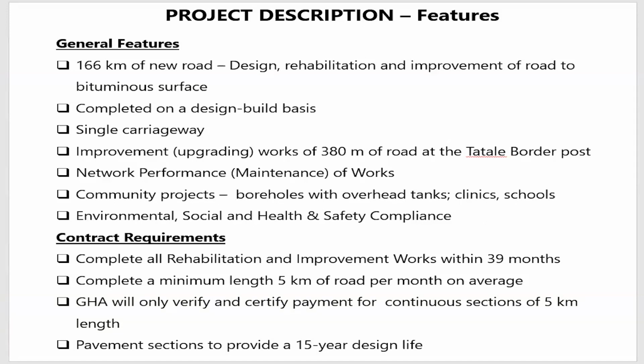We are doing a lot of complementary projects. That is to lay an optical fiber from Tamale to Yendi. The 166 kilometers, we are laying an optical fiber. I think we have currently finished 106 of the optical fiber. From Tamale, we have laid 106 of the optical fiber. We are building schools and clinics and then boreholes for the community. And then undertaking a lot of environmental, social, and health safety compliance.